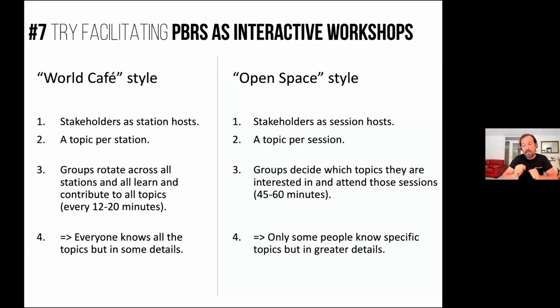And now that's the difference to the World Cafe. In the World Cafe, everybody would go through all the stations. In open space, the group decides which session they attend. And apparently, you probably don't have time for all the groups to go and talk to every stakeholder. So by the end of this exercise, by the end of this PBR, there are only some people who know about some topics, but because they spend up to an hour on that topic with that stakeholder, they know a lot about that topic, right?